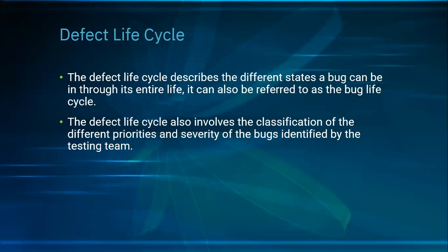But priority is, I've raised this bug, this is how we are rating that bug. This is the level at which we can fix it. The reason why we need the priority is that when we have like 20 or 30 bugs and we've just got 2 or 3 developers, it's too much for them. So the first thing is that we filter on the high priority. When we look at the high priority, we've got 10, we've got 15 high, that's fine. We first let them fix the high ones because they are critical.